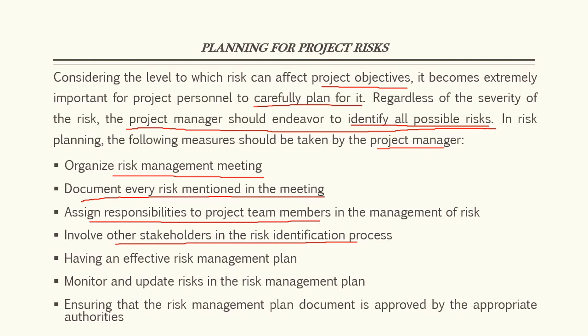Every important stakeholder, if possible, try to bring in all necessary stakeholders in this identification process, because risk is not only confined to the technical aspect of the project, but rather administrative risk should also be identified going forward. It will interest the project team to know that most of the risk besetting projects are administrative. Therefore, more attention should be given in that regard.